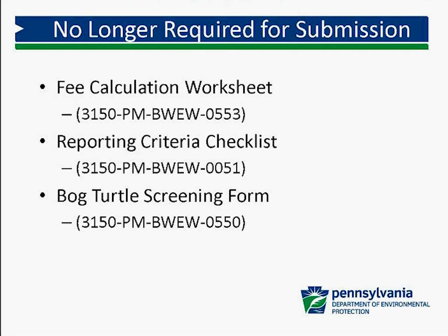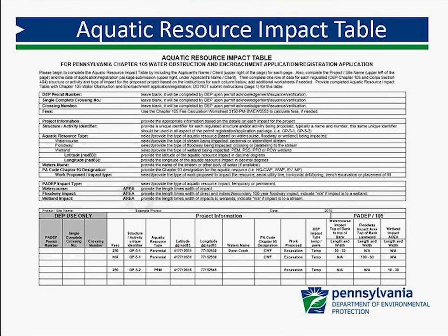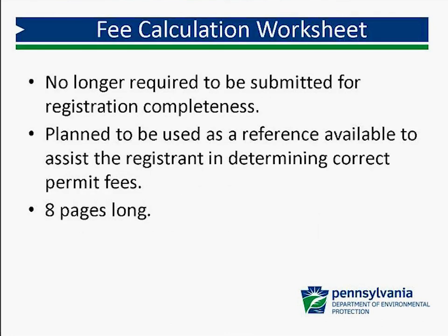It'll be used by applicants to determine what your impacts are, whether or not your activity may trigger a reporting action. It will give you the opportunity to maybe further evaluate your project and to maybe reduce your impacts or try to keep within a non-reporting threshold. It also can be used by the permit reviewer in an expedited way to determine where in the application materials to look for the information to determine what triggers a reporting action to the Corps.